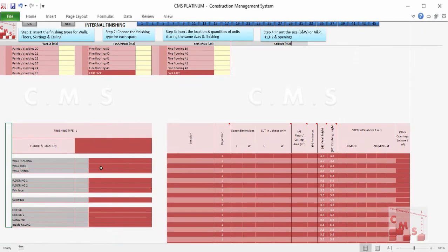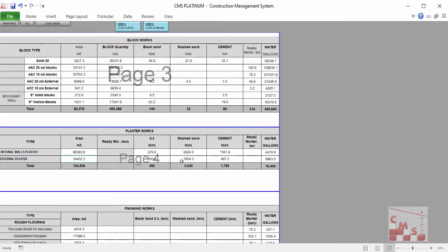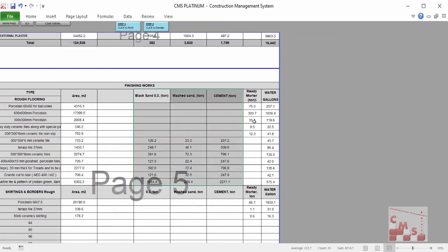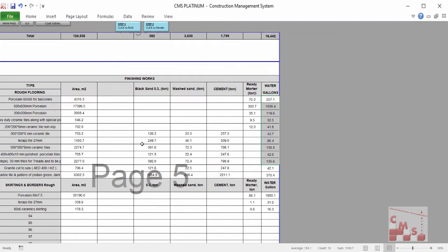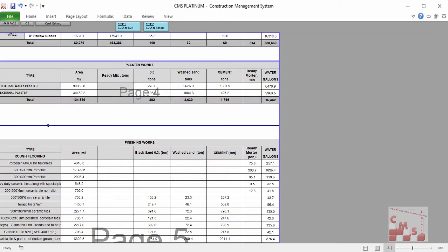Still in Quantity Surveying, the same can be done for finishing work. For any internal location, when we insert only the type of finishing from AutoCAD, CMS will give us the required quantities directly for plastering, flooring, skirting, and ceiling — with all ceiling types. This information is reflected directly in the quantities takeoff: the amount of plaster, all types of finishing, flooring, skirting, all quantities, and all required material — either ready material, ready mortar, or site-mixed mortar with sand and cement — even the water required for this kind of work.